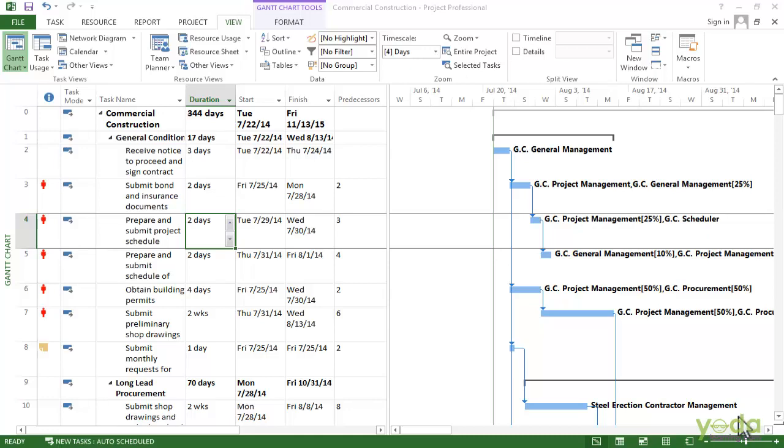When the customer or the stakeholders approve your project plan, your next step is to save the baseline in the project. You can also save additional baselines at later dates, for example, to record significant changes to the plan or to track trends and project performance. If you don't need a baseline anymore, you can clear it to remove its values.